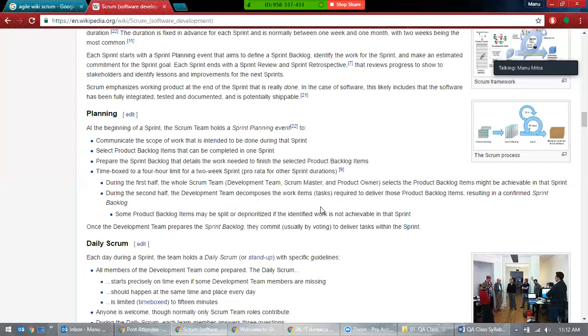If you open one defect or one impediment that is not fixed in sprint one, and we want to close that sprint because we want to deliver the project, then that defect or impediment is converted into a new user story and is followed in the next sprint. They will add a new user story for that defect.